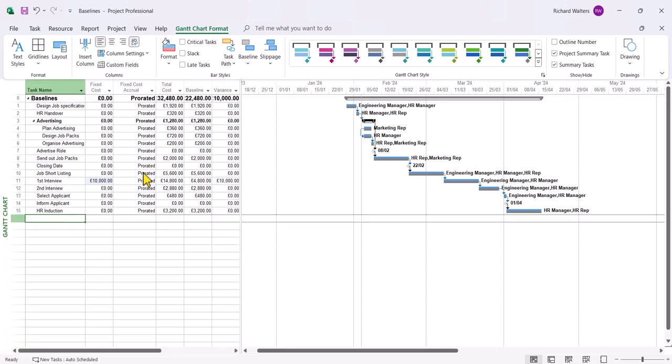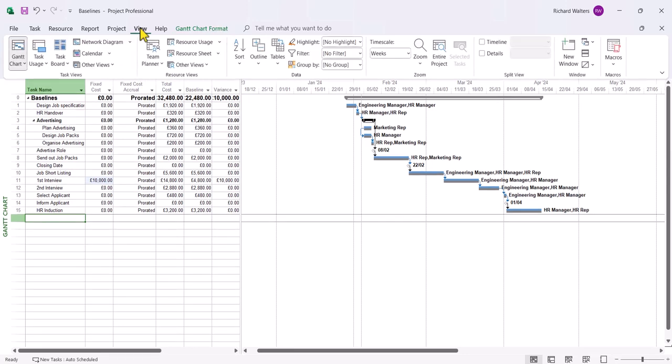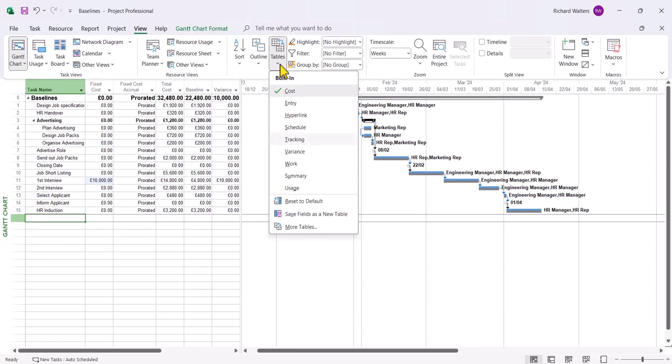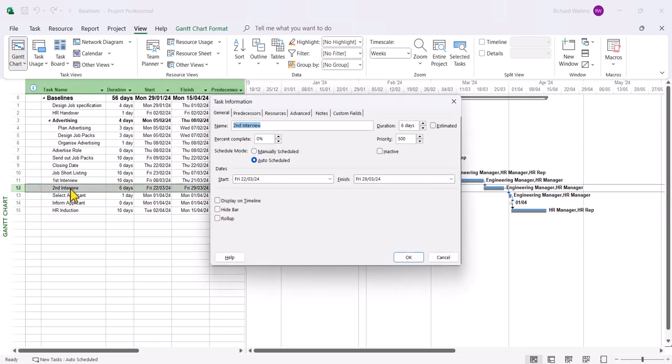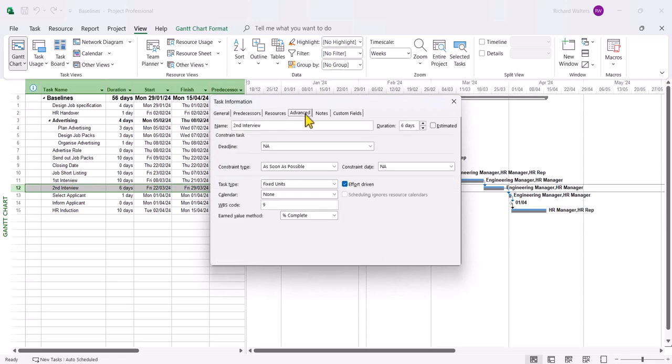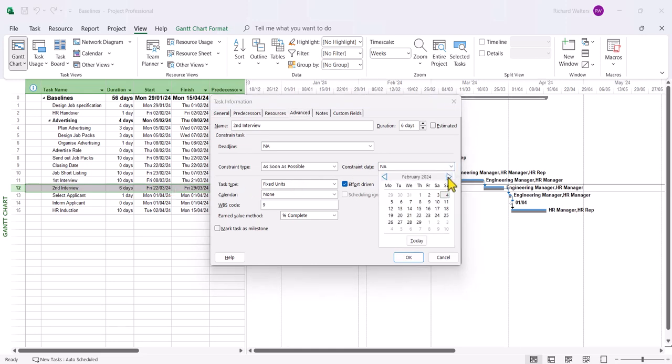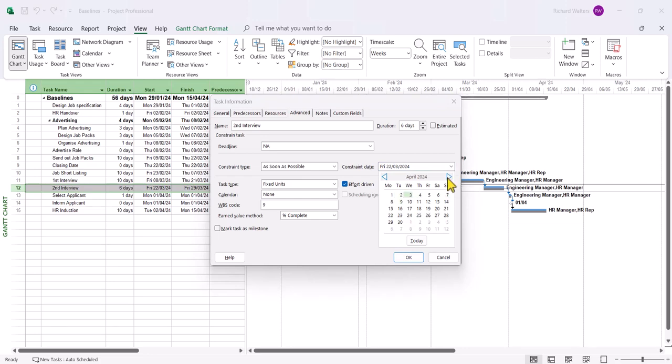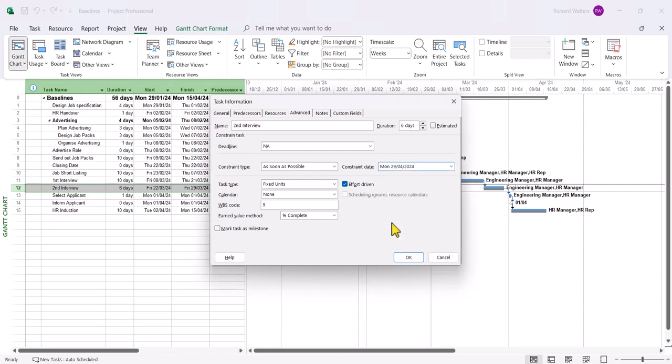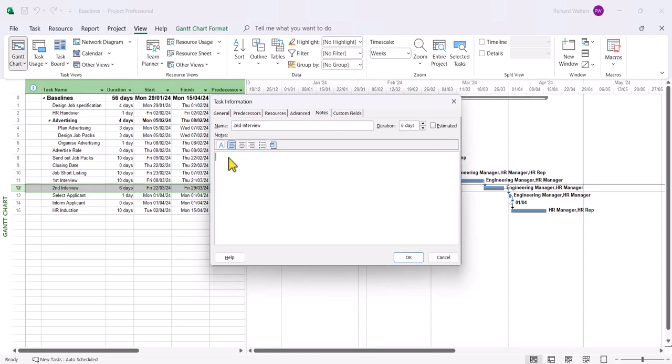We're now going to look at how dates can be affected regarding the baseline. So I'm going to go back to the entry table. And I'm just going to put a constraint against this. So I'm going to put a constraint against the second interview. So I'm just going to delay the second interview by month. Just as an example. So it's due to start on the 22nd of March. So I always tend to find that date first before I go from there. So there's 22nd of March. Now I'm just going to go for a couple of weeks. And I'm going to go forward to the end of April in this example. I'm going to go forward to the 29th. And I'll just put a little note in. Test notes. So we can see that if you want to put a reason in, you can do something like this. I'm going to click OK.